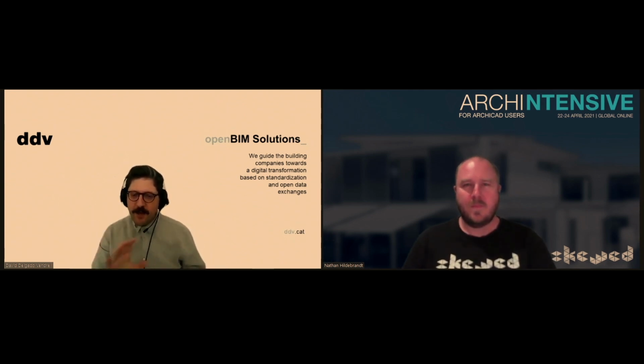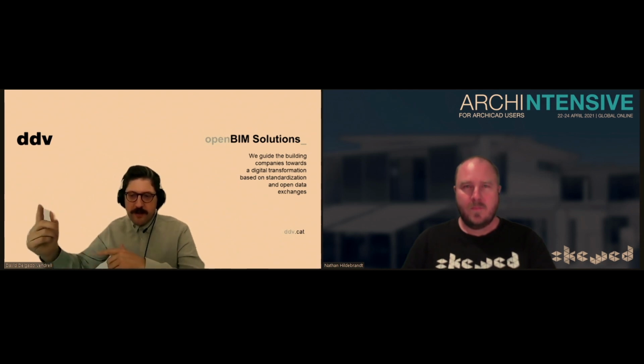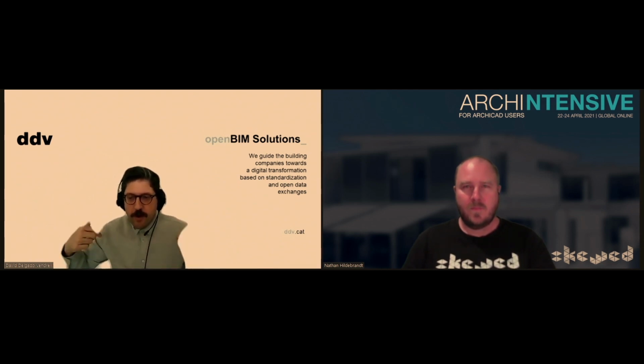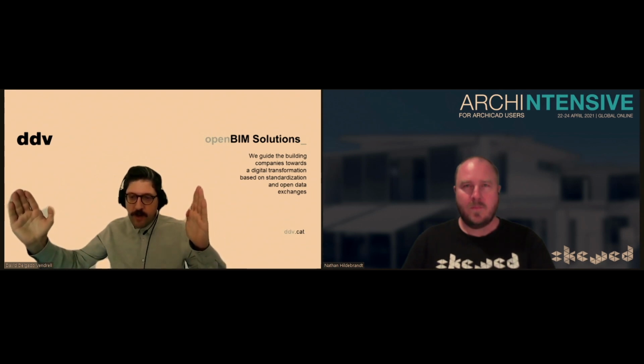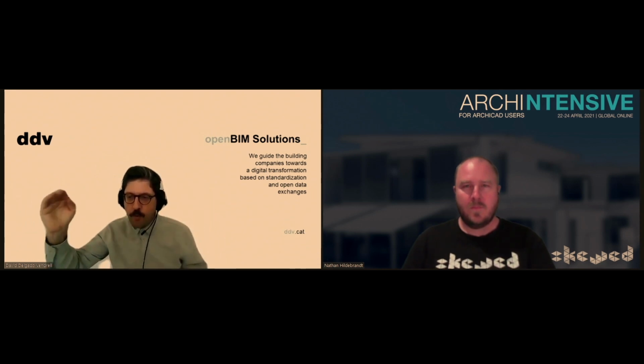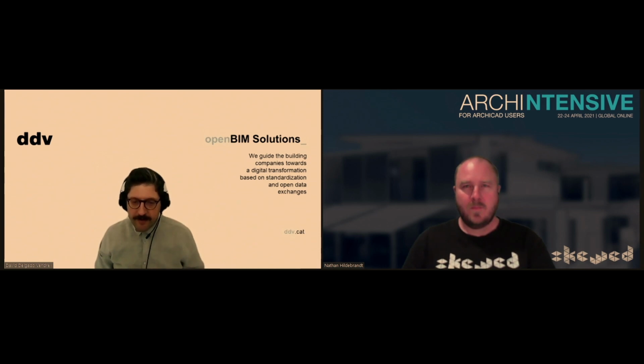the flexibility of moving pieces of work, tasks, from one sprint to another, if your client knows that you are working with Agile, and your client knows because it's attached to the contract, right? So what we are doing here is modifying our resources from one sprint to another in order to keep the final product increment within the time framework that is required in our contract. And this is how we deal with it.